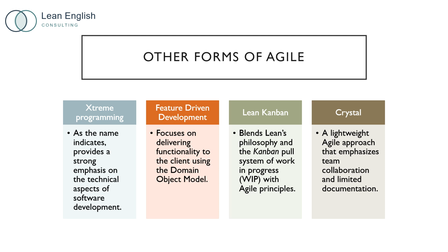principles. Projects with a lot of uncertainty will have a product backlog that changes frequently. To be more responsive, Lean Kanban constantly updates the work in progress so the team can choose new tasks as soon as they finish their current work. This way, they do not have to wait for the end of a sprint to change the project's direction.